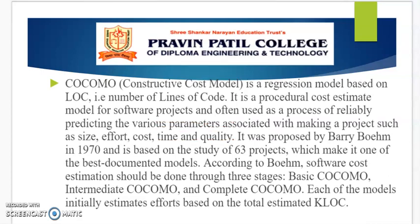COCOMO is a regression model based on LOC, that is number of lines of code. It is a procedural cost estimate model for software projects, often used to reliably predict various parameters associated with making a project such as size, effort, cost, time, and quality. It was proposed by Barry Boehm in 1981 and is based on the study of 63 projects.